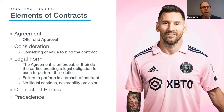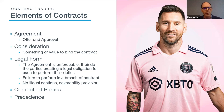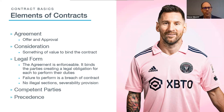The basics of a contract: there's an offer by one party and approval by the other, and binding that is consideration — it could be money or equity. The most important thing is that the agreement is enforceable, meaning no illegal sections. You want a separability provision so that if there is an illegal section, it can be carved out and the rest of the contract remains intact. There must also be competent parties — you're a professional architect — and precedence with the law always comes into play.